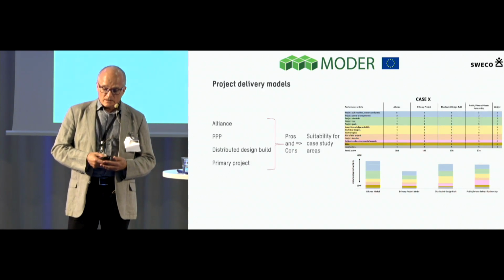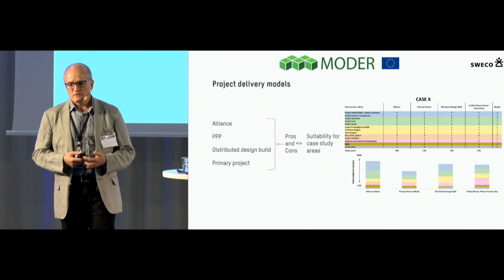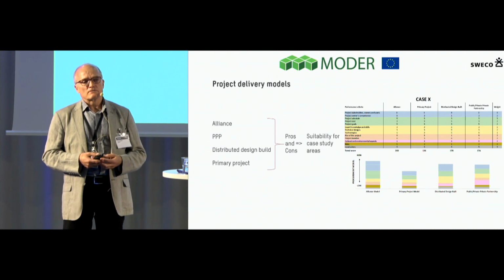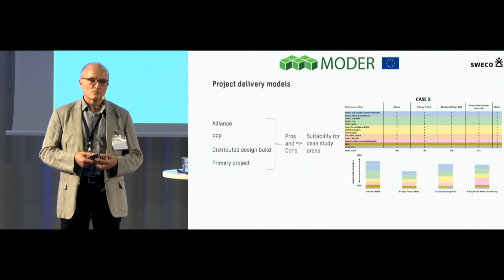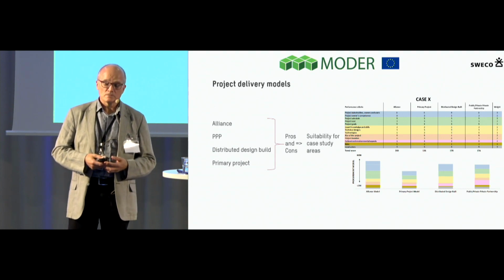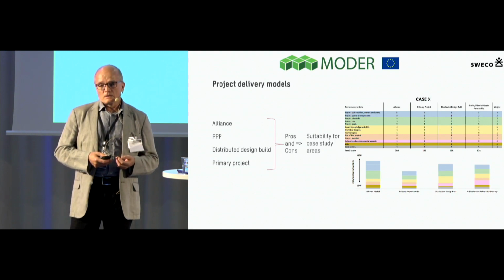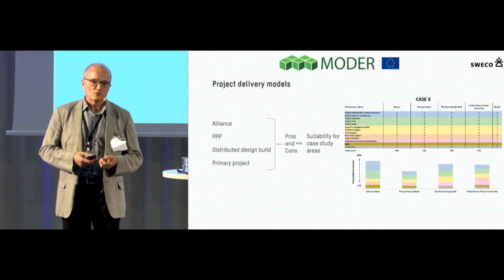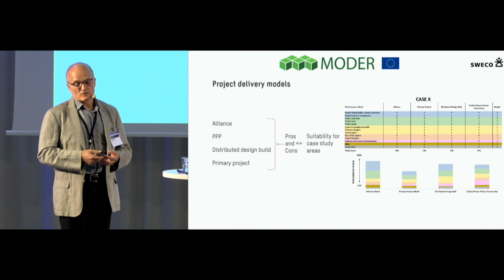Then we also looked at how this can be done. This is of course a long-term project. It's typically a big project. I think we estimated some years ago that, for instance, if we would like to refurbish the whole Peltosaari area, it would be something like an 80 to 100 million euro project, more than 1 million euro per building. But we looked at the alliance or public-private partnership, or private-private partnership project, or a distributed design build or primary project as those that would fit district level refurbishment projects best.